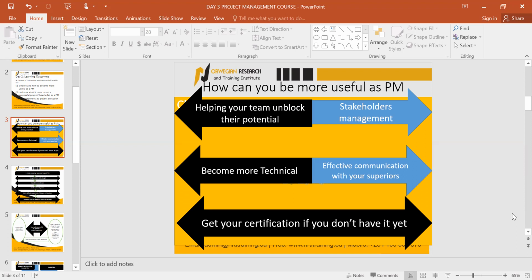So you have to ensure that the interests of these stakeholders have been met. And that's why there's the matrix of analyzing the level of influence and the level of power of each and every stakeholder, so that I know my engagement level with each individual. This is very important to be done during the stage of project initiation.